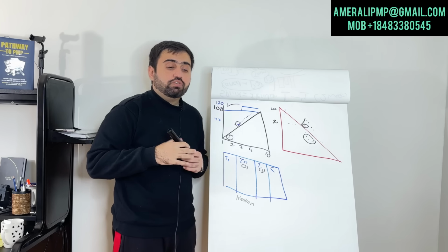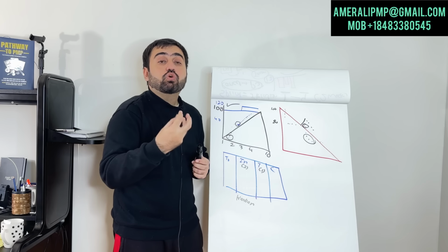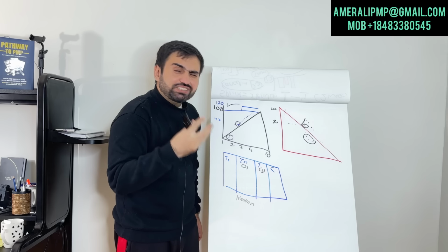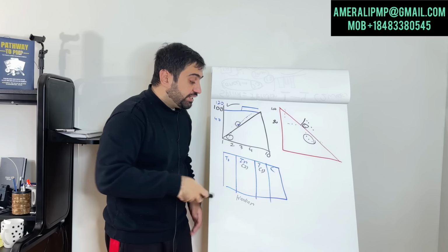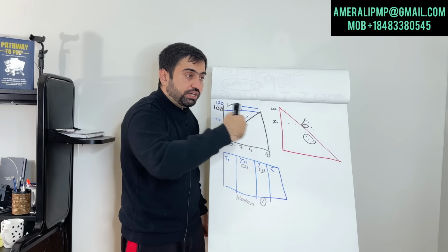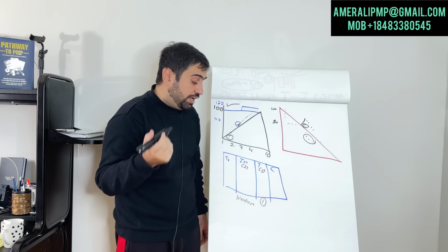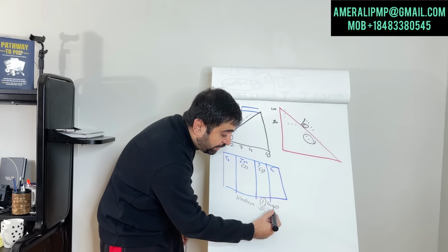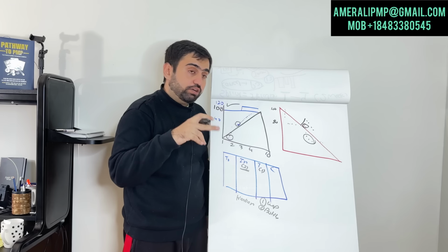You remember in COVID there used to be limit on the ground how many people can go inside. That is work in progress limit. So same thing, basically Kanban board is showing you how much work can be done by any person at any time. So it basically helps you to identify the flow I want to build, that the work does not stop, because that is the goal of lean, that is my goal. It also identifies work in progress, what is the bottleneck. If my work stops here, what is the bottleneck? It works that way.